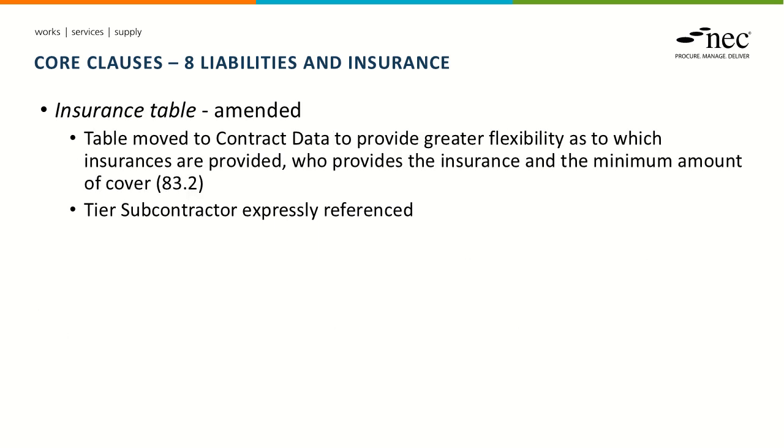One of the main changes with regard to insurance is relocating the insurance table from core clauses to contract data. And this allows or provides greater flexibility in what insurances are required, who provides them, and what sum is being insured without having to amend the contract. And also related to insurance, we've introduced or referred to tier subcontractors.